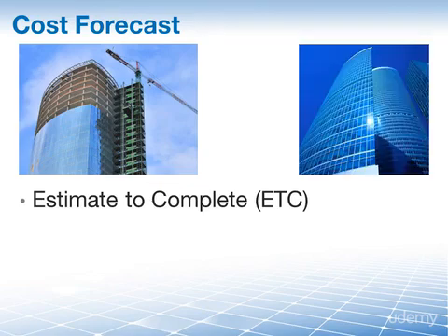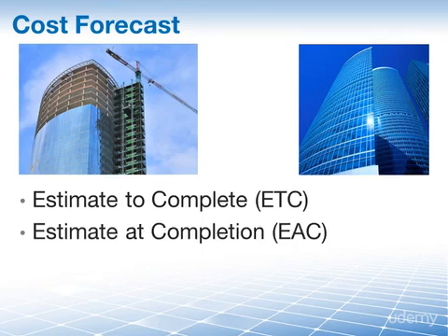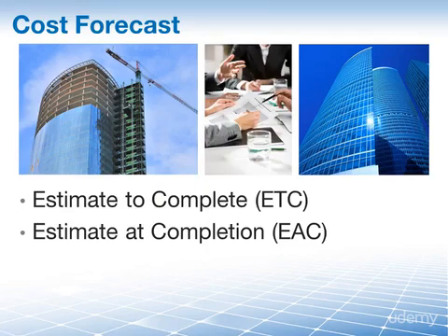So for an unfinished construction, we have to figure out what has yet to be built and figure out how much it will cost. But we also want to forecast how much over or under budget we will be in total once the project is completed. There is a formula for that, and the result is called the estimate at completion. The PMBOK guide definition for estimate at completion, EAC, is that it is the expected total cost of completing all work expressed as the sum of the actual cost to date and the estimate to complete.